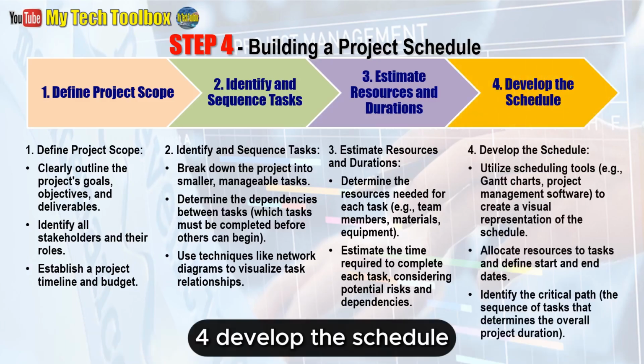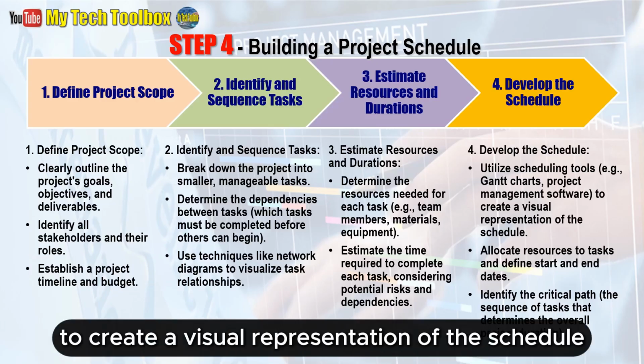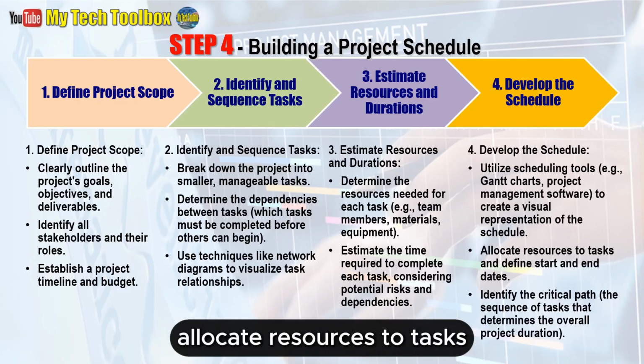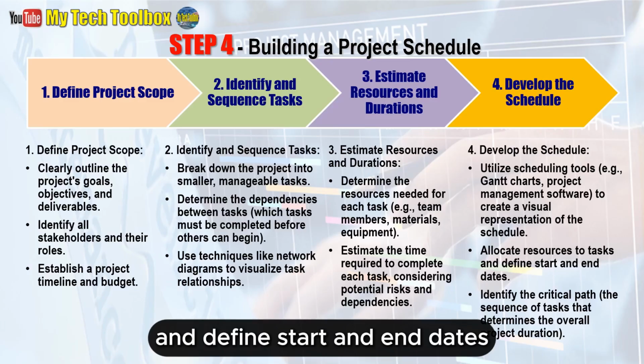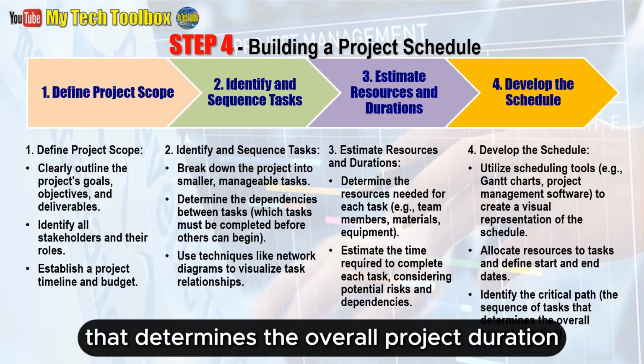4. Develop the schedule. Utilize scheduling tools, e.g., Gantt charts, project management software, to create a visual representation of the schedule. Allocate resources to tasks and define start and end dates. Identify the critical path, the sequence of tasks that determines the overall project duration.